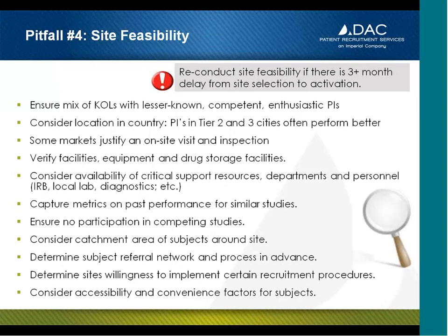Also, when conducting site feasibility, think through a site's current staffing to study load ratio while projecting, to the very best of your ability, your start date and conduct timelines. Talk through if and how competing trials will affect your screening and enrollment. This plan of action that you devise while at the site or on the phone with the site personnel should be documented in a written recruitment plan, which will be discussed in a few moments.